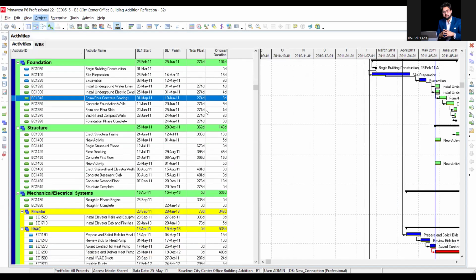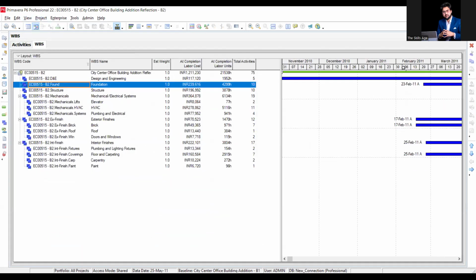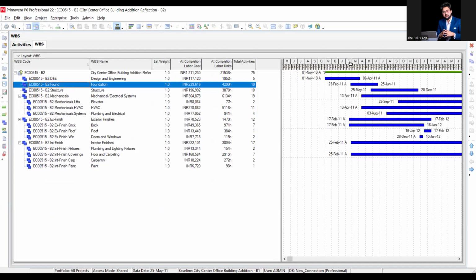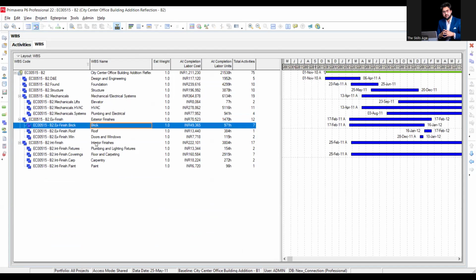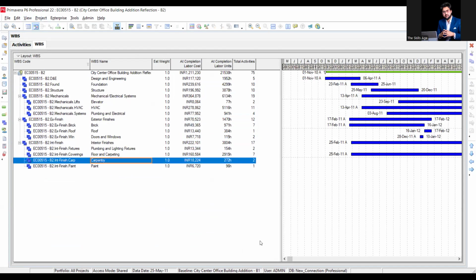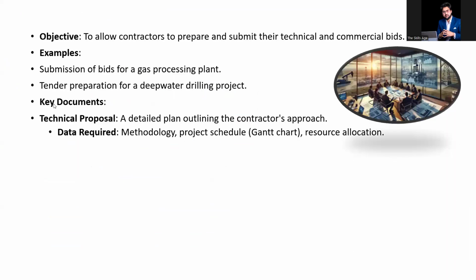Different kinds of deliverables. I'll be sharing this; you need only this document, the precise one, in the tendering process. These are the major things. This schedule should be there in the tendering process when you are going to bid, because it's written over here. That is part of the process. So what you are going to do is methodology: what is your approach, how you are going to take different kinds of deliverables, which milestone deliverables are going to be constructed on first priority, what comes after that first milestone, what is the third priority, what is the fourth one, what is the construction methodology.